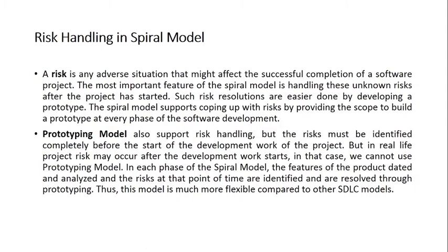Why prototype? Why are we making a prototype? We are clearing the requirements. Like I said, we are supposed to make 10 website pages. So I just make one page and give it to the customer for evaluation. That is, a prototype is made and several rounds of iteration are done until all the requirements are gathered and a page is developed which satisfies the customer's requirement. He is happy with that. Then we develop another 9 pages based on that. So that is change avoidance.